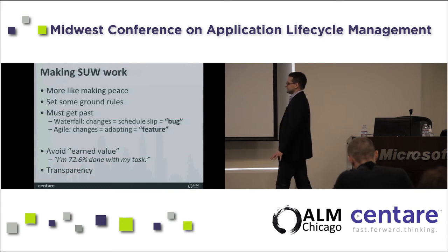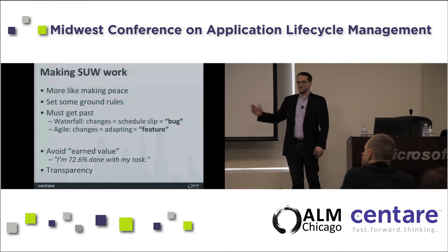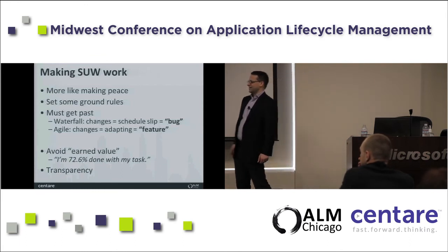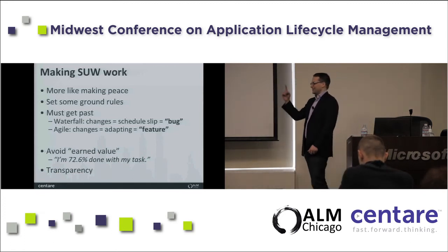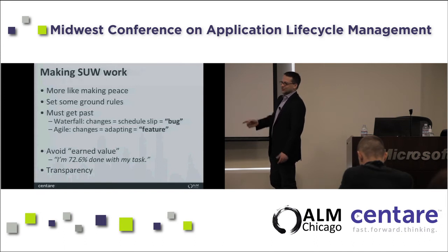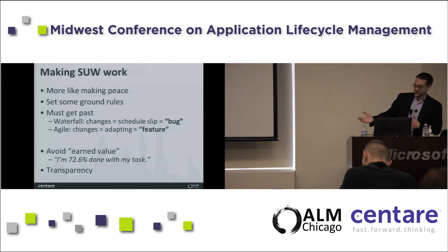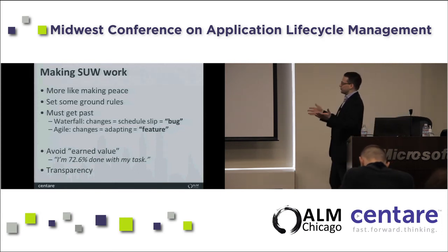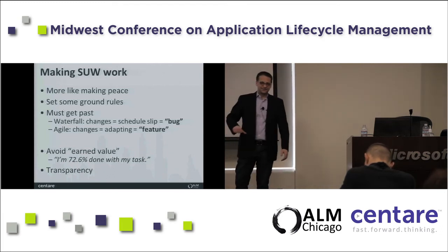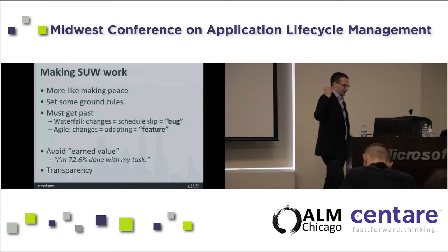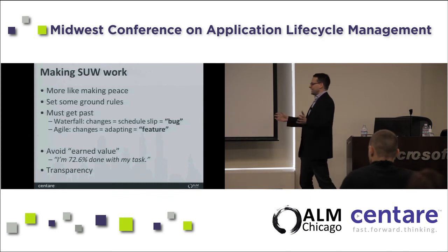Another one is the earned value problem. So the phenomenon of being a percentage done on a task. It's like, how you doing on that suite of stored procedures? Oh, I'm 80% done. Two weeks later, where are you on that task? I'm 80% done. So the first 80% of any task takes about 20% of the time, and the remaining 20% takes 80% of the time. So earned value, super popular in Waterfall. You probably don't want to do that. You want to say, is it done or is it not done? Because once again, this is another one of these cases where you can leave yourself open to everything's going great right up until it isn't.